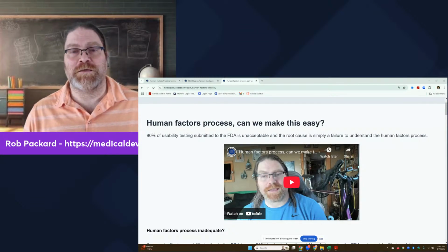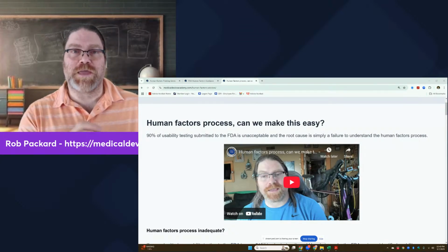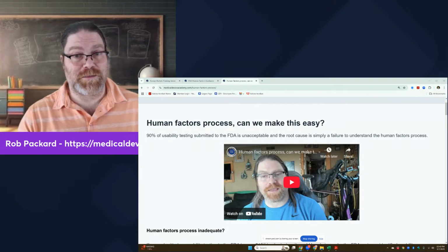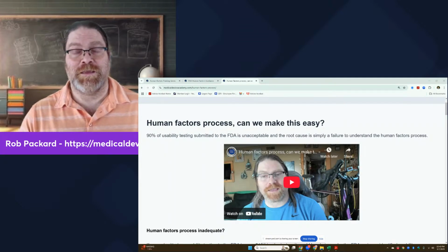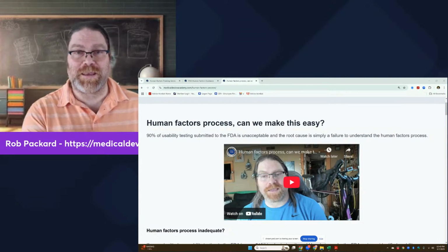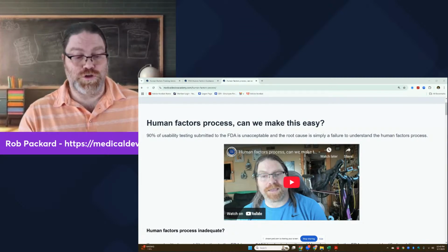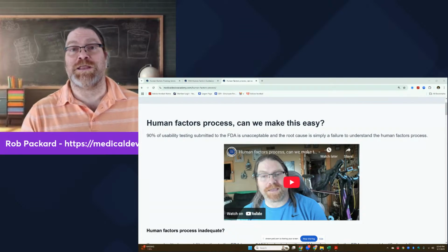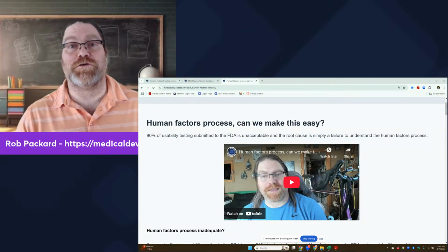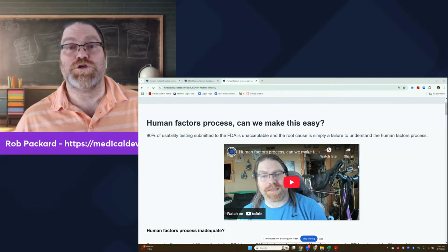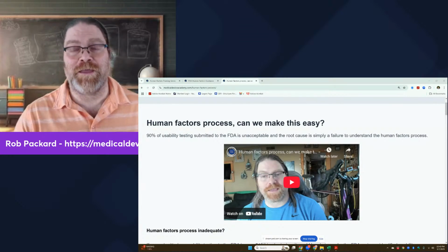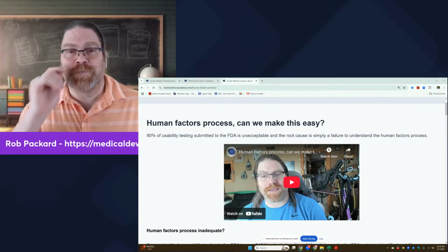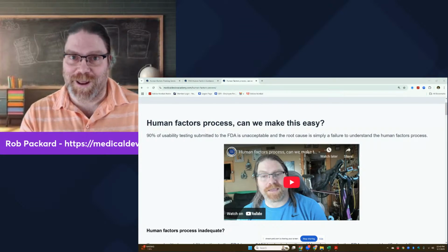That's the process. You have to document it, but you can't do the software validation at the end, the usability at the end, the risk management file at the end. It doesn't work. They have to be from the beginning. Besides, your usability engineering file, your risk management file, and your software validation have to be done before you can start your electrical safety V&V testing. So you had to do it earlier anyway than other types of V&V like electrical safety. So if you have an electromedical device, you're not going to get out of this.